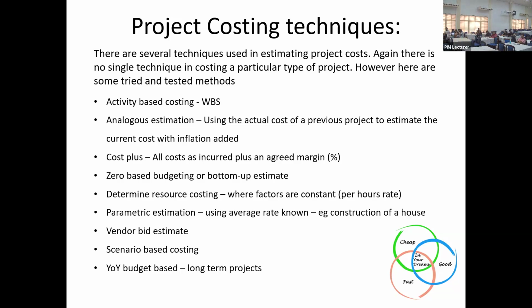Let's say your house is 5,000 square feet. Then it's 15 million or whatever that number is. So it's 15,000 a square foot. If we are building a larger house, then it's 15,000 times the larger size. So it's easy to estimate. But do you know what it was 5 years ago, to build a house in Sri Lanka? It's 5,000 rupees. Only 5,000 rupees. So if you built a house 5 years ago, you would have spent only 5,000 a square foot. Today you are going to spend 15,000.